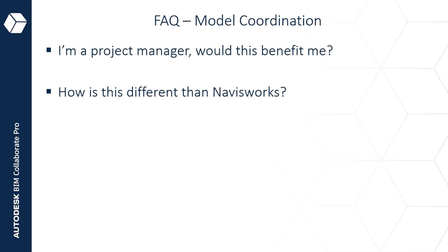From a Navisworks point of view, someone would share a model with you, you'd download it, you'd save it, you'd append it into Navisworks, run a clash detection, send a report. People would go and fix their model. Next week, you complete the same process.